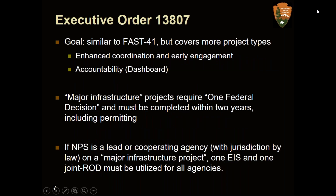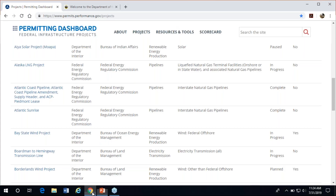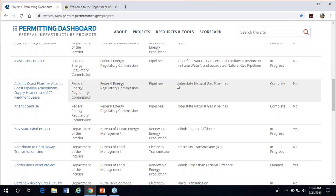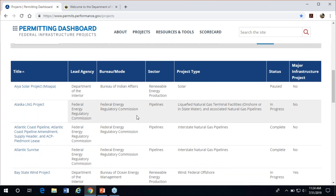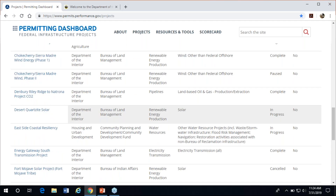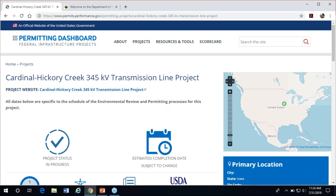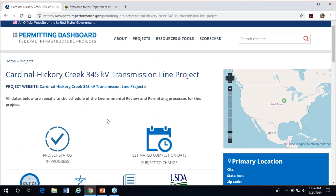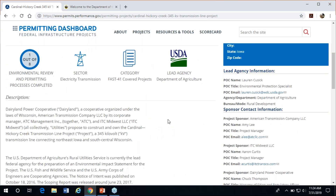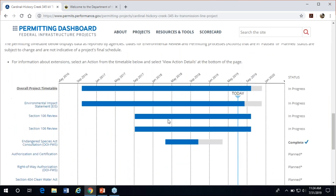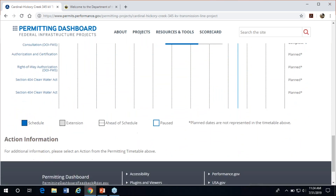Here's what the permitting dashboard looks like — you can Google 'FAST 41 dashboard.' These are some ongoing projects. The Cardinal-Hickory transmission line, for example, affected the Ice Age Historic Trail. The dashboard provides contact information and a project timetable showing what's been completed versus what's in progress. All the required timelines from the NEPA process to permits are publicly available. If you're the Atlantic Coast Pipeline project and want to know how close the Corps of Engineers is to issuing a 404 permit, you'd find that here. Those dates are expected to be fixed.